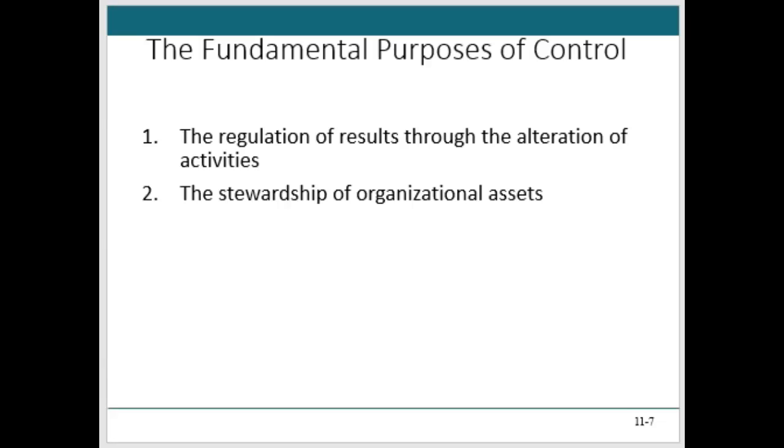For example, if I have 10 resources sitting around and I go, you know what, I'll call them forward a couple days early, make sure I can stay on time. No, that's not good stewardship of the assets. Frankly, at that point, we've lost control. We want them just in time. And when their work is done, we want to release them, right? So the regulation of results and the stewardship of the organization, it's a balance that we are working through.